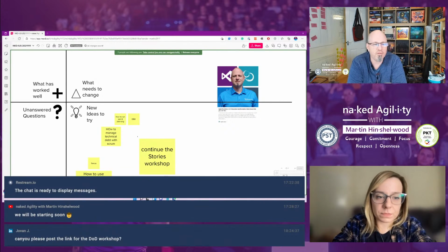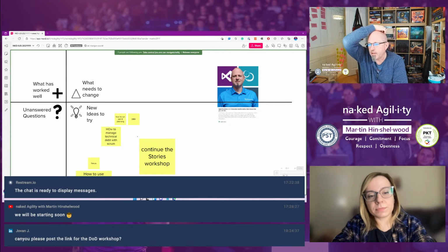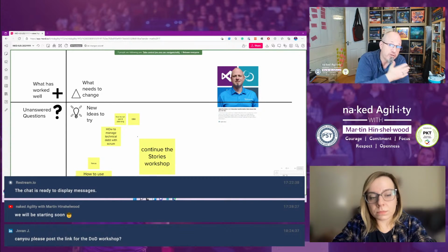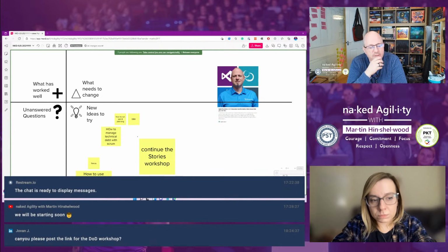Well, yeah, that's okay. The way I've seen it, Microsoft for a while used UserVoice, right? So not just tickets. UserVoice was not for support tickets, but for what I would like. The customers' desires could go on UserVoice and everybody could vote on them, and then they would filter the ones that they wanted to do into the system. And they have a separate support ticket system that I think probably does the same. It ends up on somebody's list and then it's approved to go into the team's backlog.